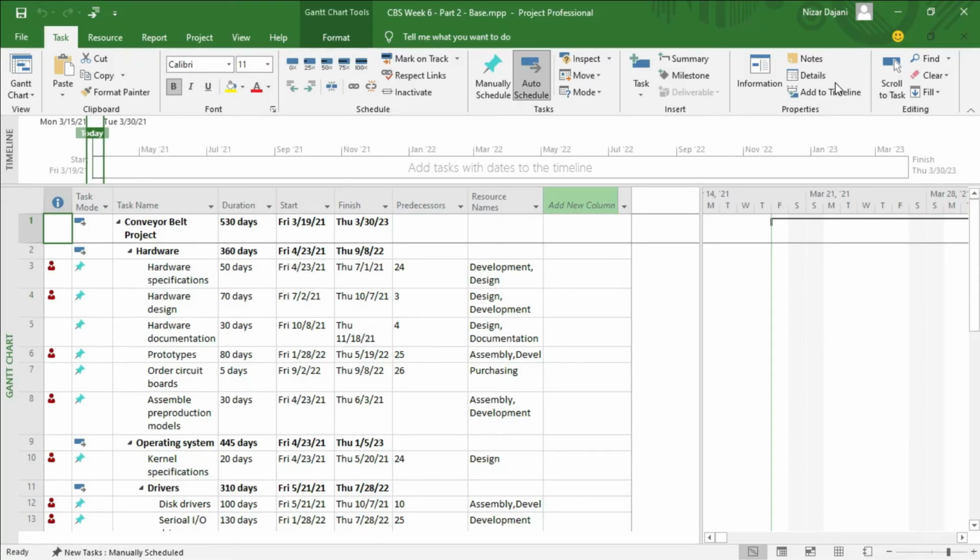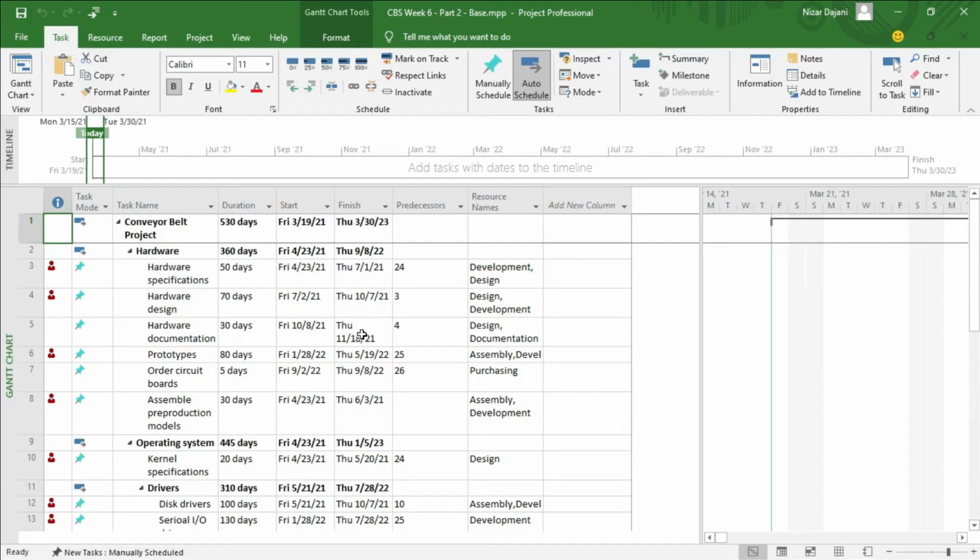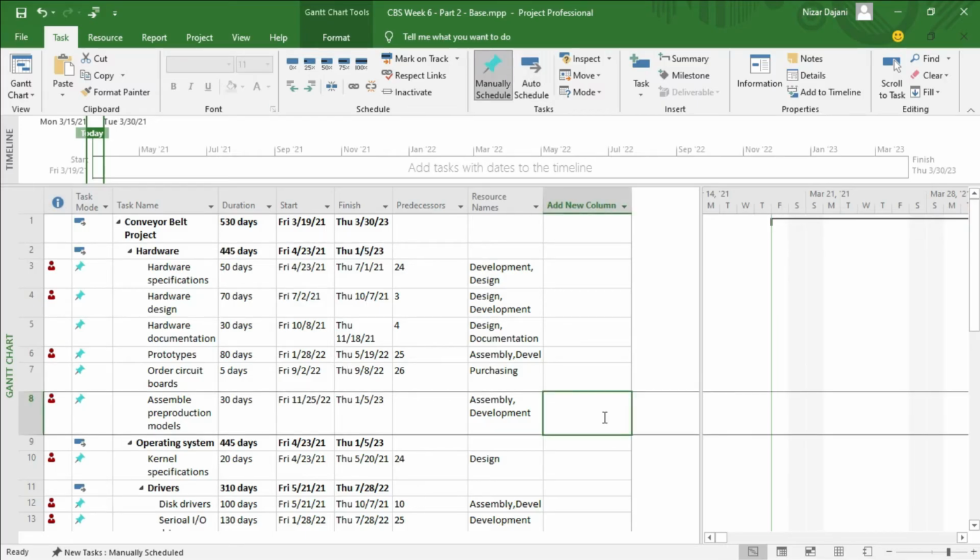All right, so I'm back again. I entered in all this information, again the resources, the duration, and the predecessors for all the tasks, all based on the table in our book, which is A2.10. Now, I specifically left this task empty in the predecessor field because if you look at the table, it says we need to enter 17 FS, comma, lag 50 days.